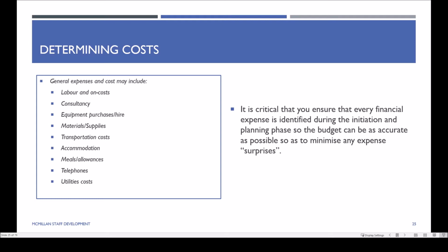If you're working in the private sector and you're managing a project, you would be accountable for all these costs. Within the public service, what you might find is that as part of your project rationale, even though those costs may not be incurred by your team or your cost center per se, you may still need to identify those so that you can still put a final financial figure to the cost and return for your project.